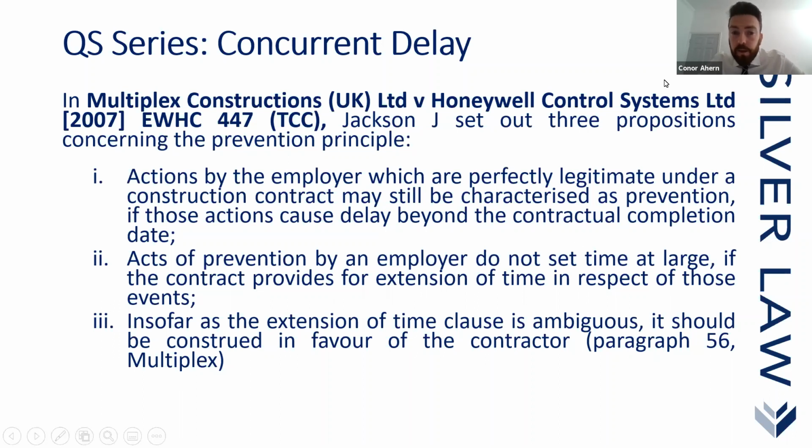But we don't see time at large arguments quite as frequently anymore, because the standard forms of contract have been updated to such a large extent that most events that occur on construction sites at present are catered for under the detailed relevant event or compensation event grounds listed in standard forms.